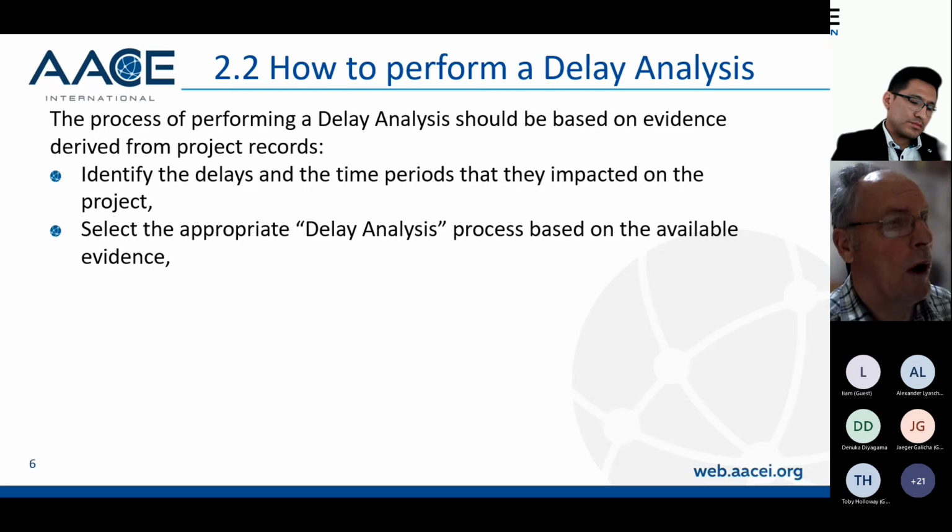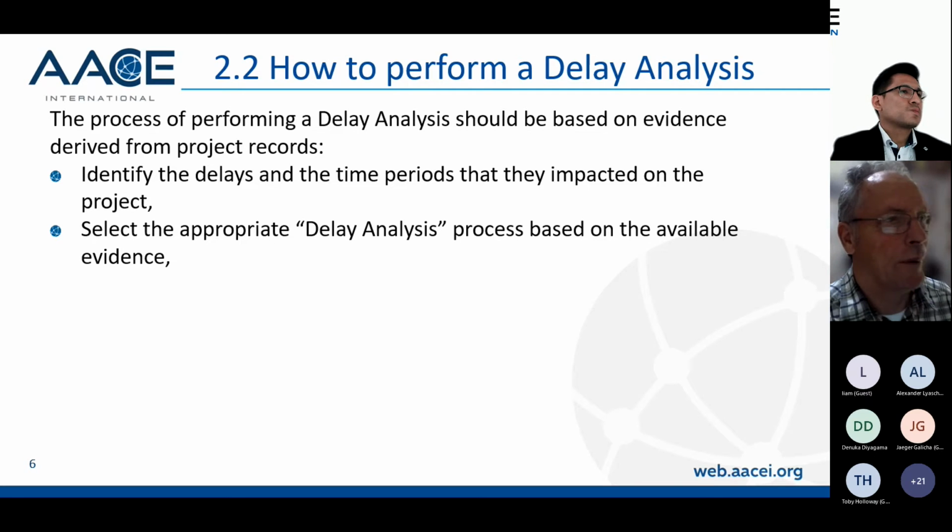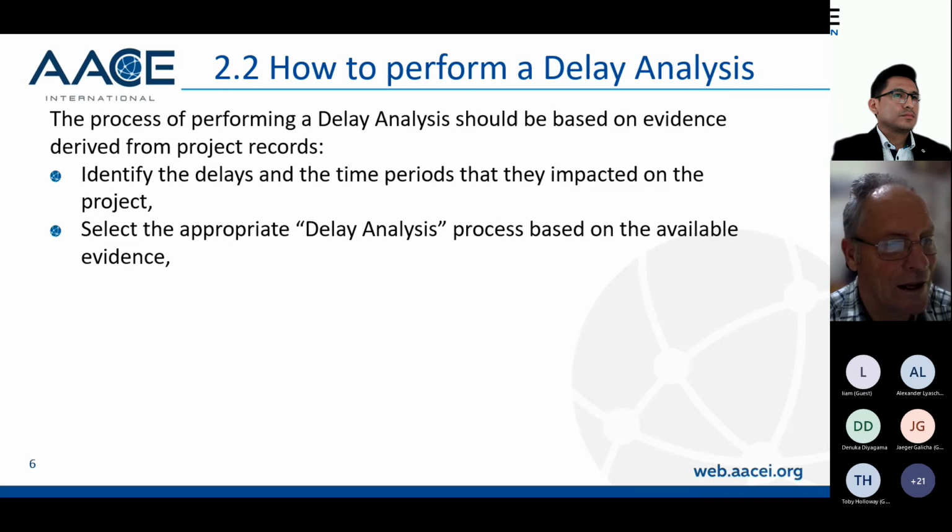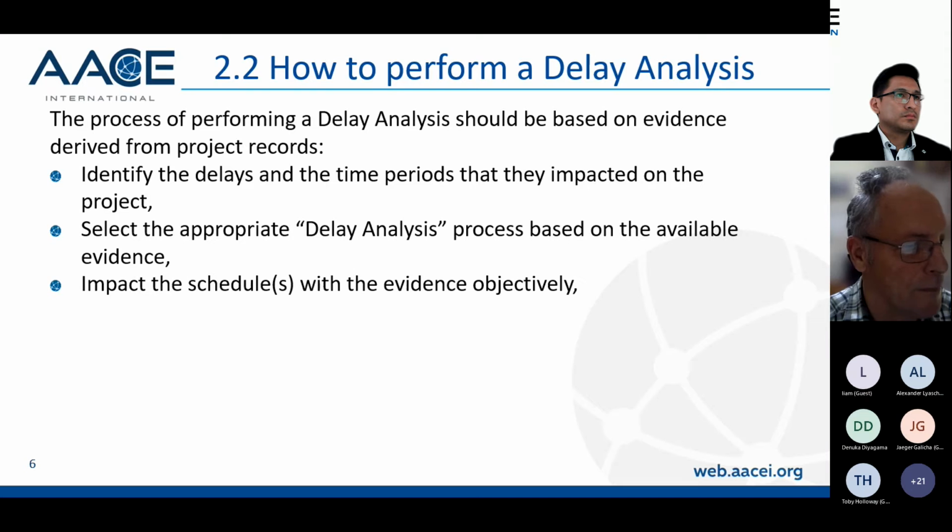So depending on when you are claiming the delay, if you're claiming the delay at the end of the project or if you're claiming the delay during the project, depending on what the evidence is that is available, depends on how you're going to claim that, how you can demonstrate the delay. There are a number of delay analysis processes, and you must decide what process you want to use. And it's really useful if you can agree with the customer as a contractor what process you're going to use. And if you can agree on the process at the beginning of the project, it makes it a lot easier. So you're not going to arbitration arguing about the process, you're only arguing about the delays.